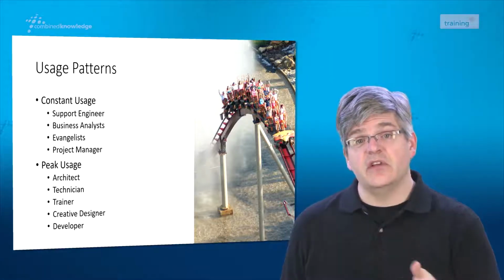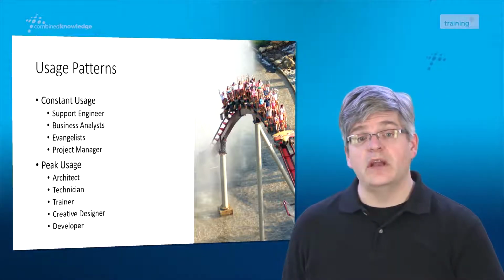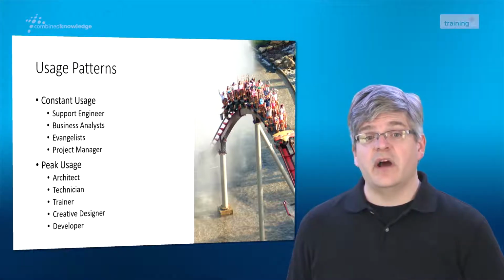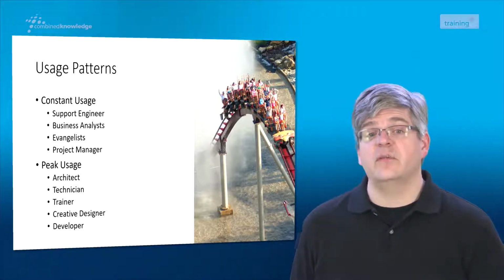An architect may be building the solution and be at nearly 100% utilization for a couple of weeks, but then trail off and only monitor the project. The technician who's deploying servers may have a huge spike when they're getting servers deployed and during launch time, but may not have much effort through the rest of the project. Creative designers, for the creatives, is going to be busy, and developers are busy developing any customizations, but only when those customizations are needed.